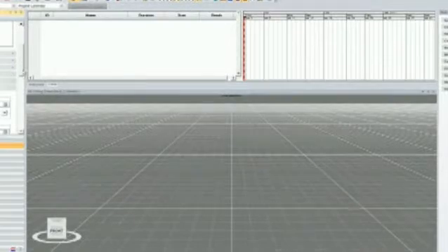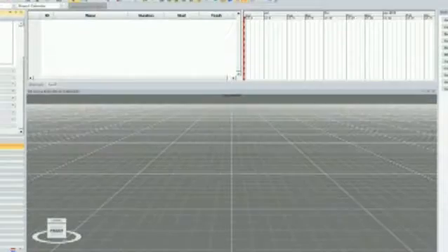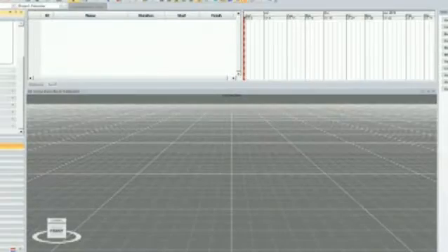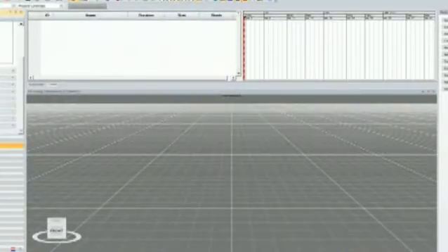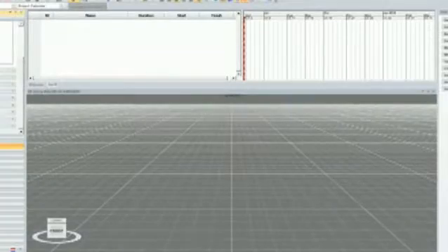If I zip these tabs down, you'll see we can create 3D paths in Synchro, so I can create a path, attach an object to that path, and move it along that path over a specific period of time. So crane movements, equipment movements, those kinds of things in the model very quickly, very efficiently. We can create text properties. We can rotate the model, translate it, scale it, world align, measurement, and user fields.